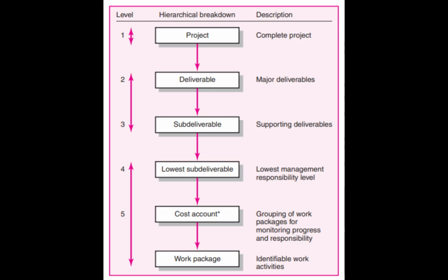The WBS starts with the project as a final product to deliver. In Step 1, the most important systems/products of the work to be delivered are identified. Then, the subproducts necessary to reach these. The process repeats itself until the detail of the subproducts is small enough to be managed and one person can be in charge of it. This subproduct is subdivided even more into work packages.